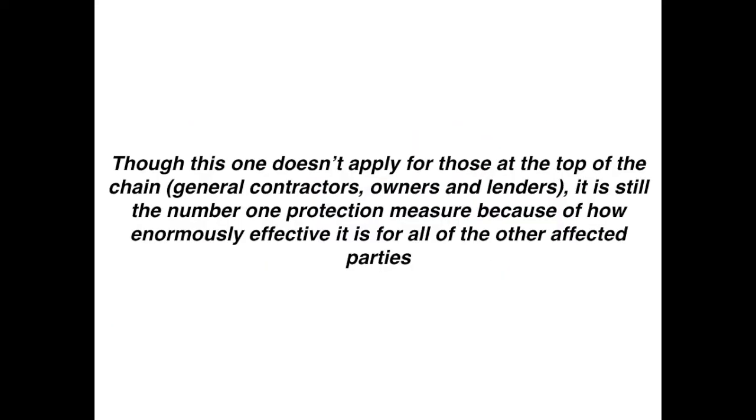Lien rights. Though this one doesn't apply for those at the top of the chain, like general contractors, owners, and lenders, it is the number 1 protection measure because of how enormously effective it is for all of the other affected parties. In fact, it is even effective for the defaulting subcontractor, as it can put it in the best position possible to claw its way out of a bankruptcy proceeding. This is why I always suggest if you're a subcontractor, own your lien rights. Make sure you get lien rights.